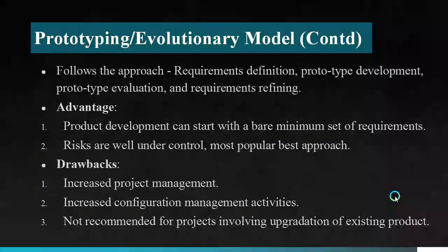Follows the approach: requirement definition, prototype development, prototype evaluation, and requirements refining. So basically, these are the approaches used here. The requirements are specified, the prototype is developed, the customer evaluates the prototype, and then again, if any refining needs to be done, the requirements are refined. Advantages: product development can start with a bare minimum set of requirements.